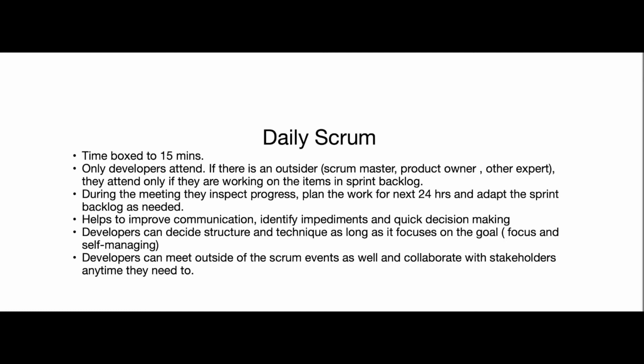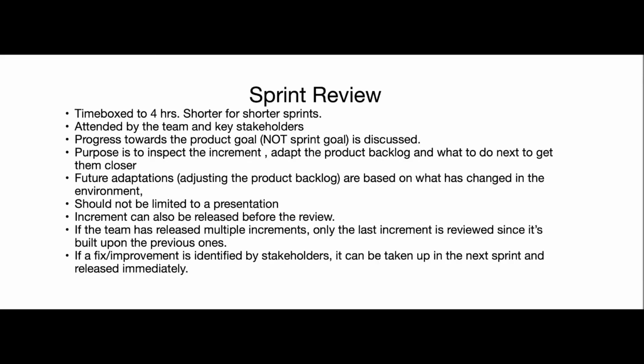During the meeting, they inspect progress, plan the work for the next 24 hours, and adapt the sprint backlog as needed. It helps to improve communication, identify impediments, and quick decision making. Developers can decide the structure and technique of the meeting as long as it focuses on the goal. Developers can meet outside of the Scrum events as well and collaborate with stakeholders anytime they need to.